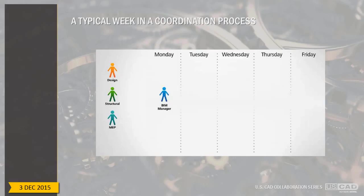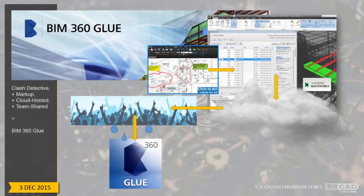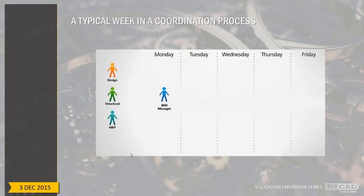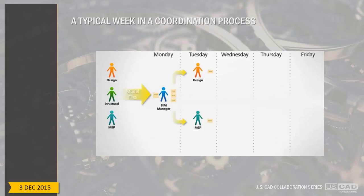Let's look at a typical week in a coordination process. In typical scenarios, you have your BIM manager dedicated by the team, and the other disciplines on the side. At some point they throw all their information at the BIM manager, who collects, processes, and distributes it to the appropriate members. Right there are already two opportunities for information loss — the disciplines might have missed something, and that person might have misinterpreted what the next person needs.